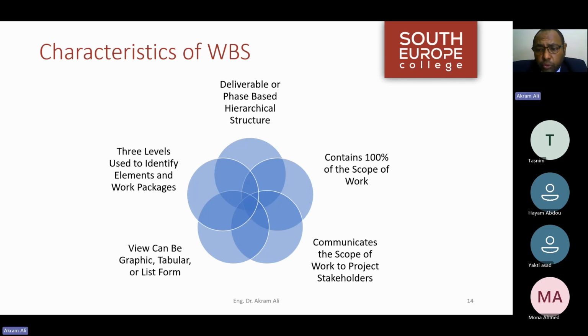damages against milestones. And here, from practical experience in payment against milestones, it's customary to know that material on site for a certain package will result in entitlement for the contractor to receive 80 or 90% of the value of a certain work package.